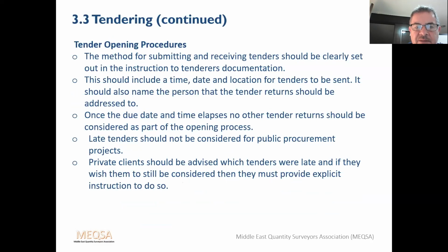Once the due date and time elapses, no other tender return should be considered as part of the opening process. Late tenders should not be considered for public procurement projects. That's key. Private clients should be advised if tenders were late, and if they wish them still to be considered, then they must provide explicit instruction to do so. As I was saying, the public sector are very strict to ensure that there's no fraudulent activity.